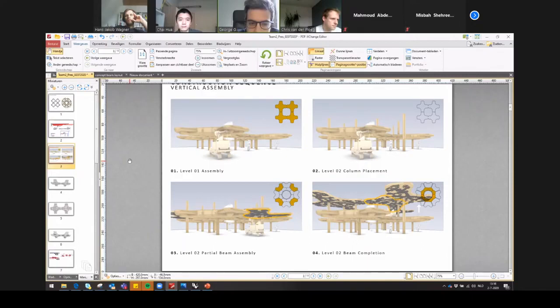By doing that, your robotic arm can still be on ground level, and you could still assemble. If you see the little diagram on the right, you could still assemble those portions of the slab above. Then the next step would be to raise that slab, get the robotic arm and vehicle on the second level, and finish the remaining half. We thought that would help avoid having much more temporary construction and scaffolding and whatnot, so you could keep on building level by level.